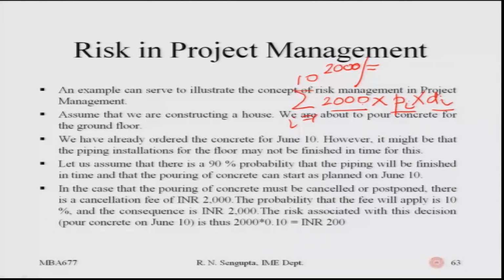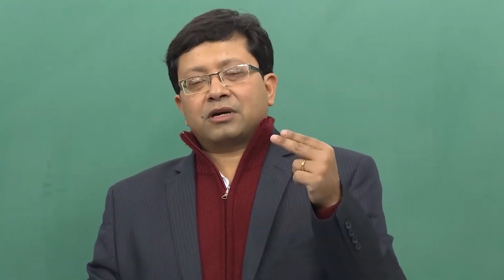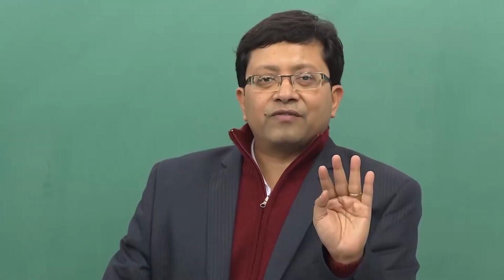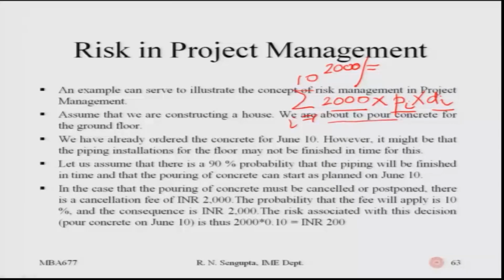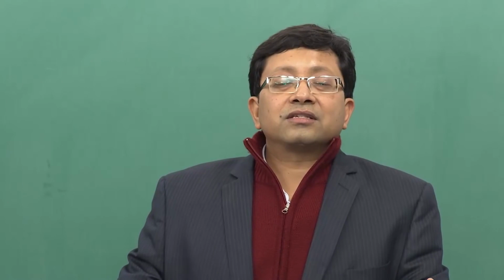Say, for example, you are delaying the project. It may happen that the customer to whom you are trying to deliver the product has a clause in the contract that for delays of the first 5 days the cost is 2000 rupees per day. So, if you have delayed your project for 5 days or less, then this calculation, considering the dependent structure for the probability and the number of days, is as given here. But say, for example, the contract says that after 5 days the overall cost increases from 2000 to 3000